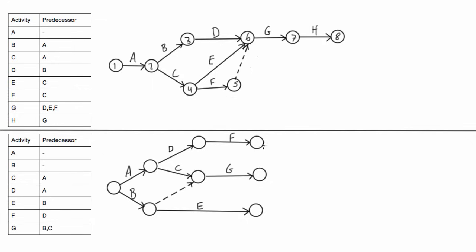So the best way to do this actually is to instead of drawing F to its own node just bring F down to the same node that G ends on and then bring the node that E ends on to the same node that G ends on just like this.